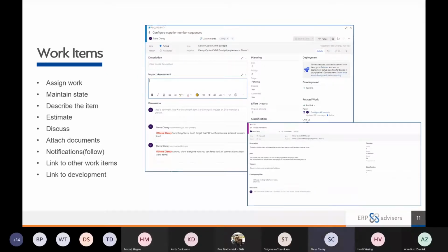A really interesting feature in work items is the discussions field. So hopefully you can see on the top requirement screen there that I'm showing, there's a brief discussion. Now, discussions are a way that your team can have a conversation about a work item and build up a rich history of the point at which you're at, if you like. You can also make use of the @ symbol in those discussions, and if you use that, that will actually send a notification email to the person who you've referenced, so that they know to come and have a look at a question that you've asked them and give you a response, or indeed you can just ask people to come and have a look at this work item just generally.